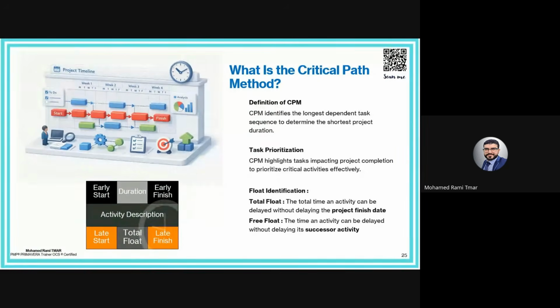However, this threshold, of course, should be used internally as a proactive tracking approach and should not be reflected in the official schedule update. Instead of putting zero float as a critical definition, we can put, for example, 10 days of float. But this is internal tracking, and cannot be shared with the client.